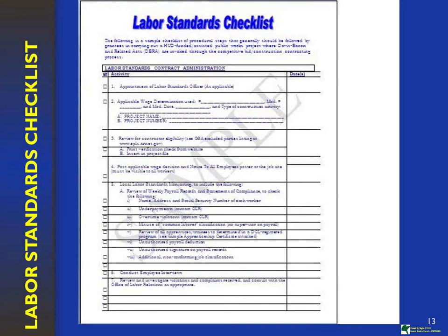And then item number 3, I had the computer up here, so I can't. Thank you. I think I need some new glasses, because you're further away than I am. Contractor eligibility, that's the EPLS listing. You would go into the EPLS listing and put the prime's name in and find out whether or not they are eligible to do business using HUD funds.